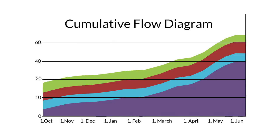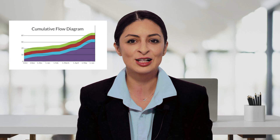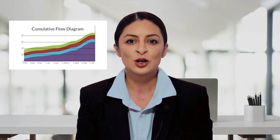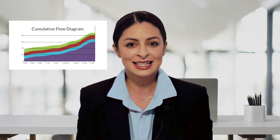Here the areas are all progressing in parallel. If your CFD looks like this, congrats — this is the ideal outcome. Your throughput is consistent, and new and done items are flowing at similar rates. To improve, you can focus your efforts on shortening the cycle times of your tasks.